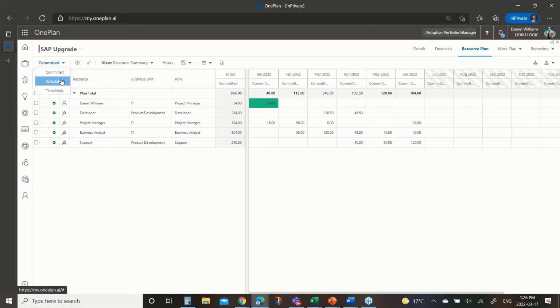And then later, if we're going to do timesheeting or any other kind of updating, we can bring that in as well. So we can then compare and see what was the original commitment, how did we schedule the resource, did the scheduling align with the commitment in terms of timing and quantity, and then in the actuals, the timesheets, what actually got done and how is that transitioning as we go through it. So we have all three of those views here.